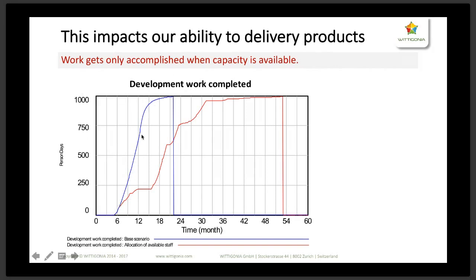And here's the original run, and here is our new development scenario. There you can see that we are running sideways here at the times when we have to roll people off the project, with the result that our project release is much delayed by about 30 months or so. Not an uncommon scenario. A lot of people are speaking about the rule of thumb that it takes at least 2 to 3 times longer when you are running a project in an existing organization. And sometimes it may never see the marketplace.